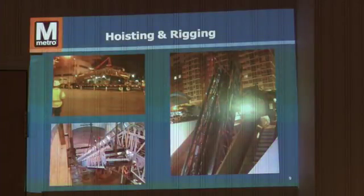We have to not only replace the sprinkler system, the electrical systems, and other different components that are in this wellway related to the escalator as well. So it's not as simplified as some would think. It's a lot of activity involved here, and to simplify it would just grossly take away from the magnitude of this project. And as we say, we're working throughout the region. There are about 79 escalators within this project that are being replaced in the district to date.